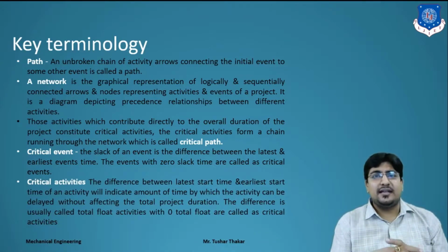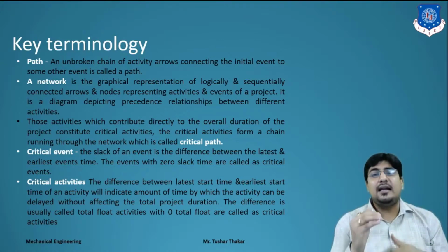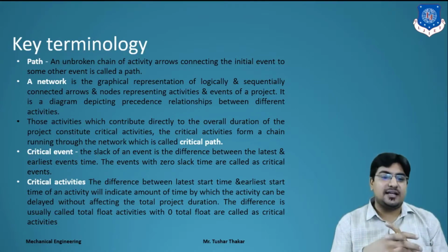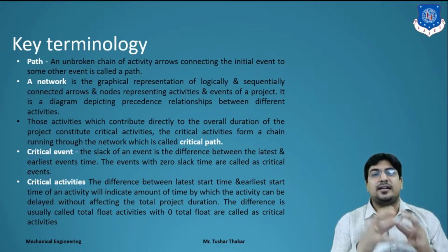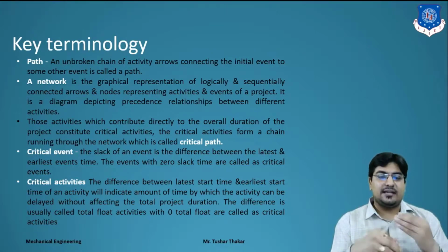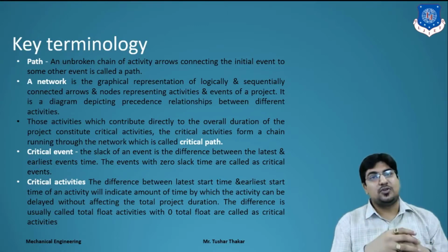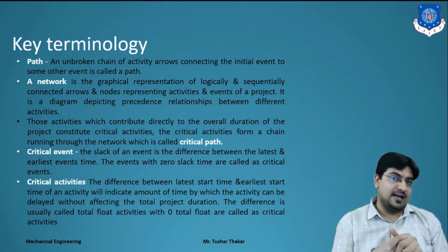Critical activities means activities that lie on the critical path. The difference between the latest start time and the earliest start time of an activity indicates the amount of time by which the activity can be delayed without affecting the project duration. This difference is called the total float of the activity, and activities with zero total float are called critical activities, right?